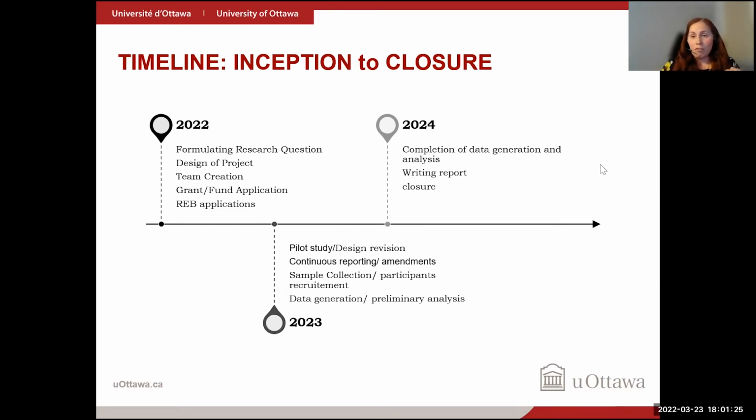And a very, very useful advice, going back to the communication point that Marisa brought up, write quarterly and yearly progress reports and self-imposed checkpoints of meeting with the team at different points in time. These reports are usually anyway required by your funding agency generally, but it's also important for you to do them if they're not required, because it helps you check on how the project is proceeding and if there's a change of direction that is needed, and it keeps you in touch with all the different team members of your project.